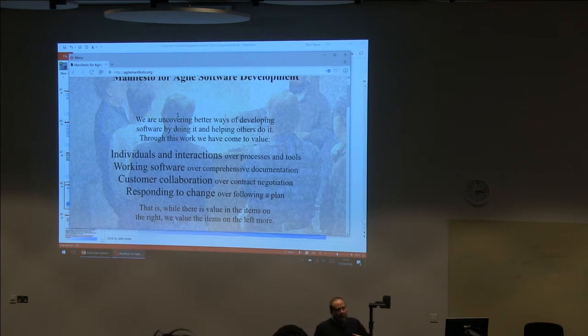Okay? Agile methodologies involve the stakeholders throughout, and that's what makes them good. However, it also makes them a bit anarchic. So it may not necessarily be the best approach for you. It may well be that you have access to your stakeholders at the start of the project, and then they're not going to be available for 6 months. So any agile methodology would not be appropriate.